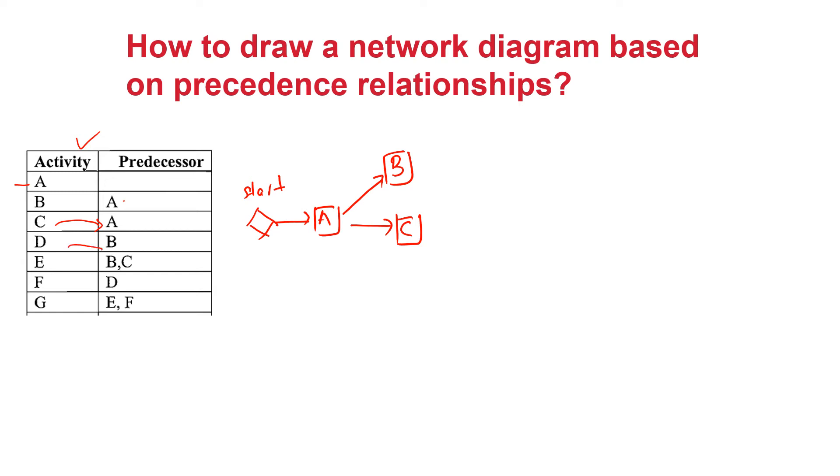Now if you look D has a predecessor B which would indicate through this finish to start arrow. We must finish B before we could start work on D. And E here in this instance has got two predecessors as you could see depending on B and C. So E would depend not only on B but also on C.